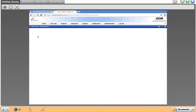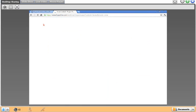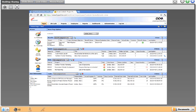By updating his timesheet, the time Barry spent is recorded. PPO supports capturing time against tasks, risks, and issues — not just schedule tasks — because resources often spend significant time on risks and issues. You can also record non-project time within PPO for timesheet purposes, such as leave, training, and operational work.